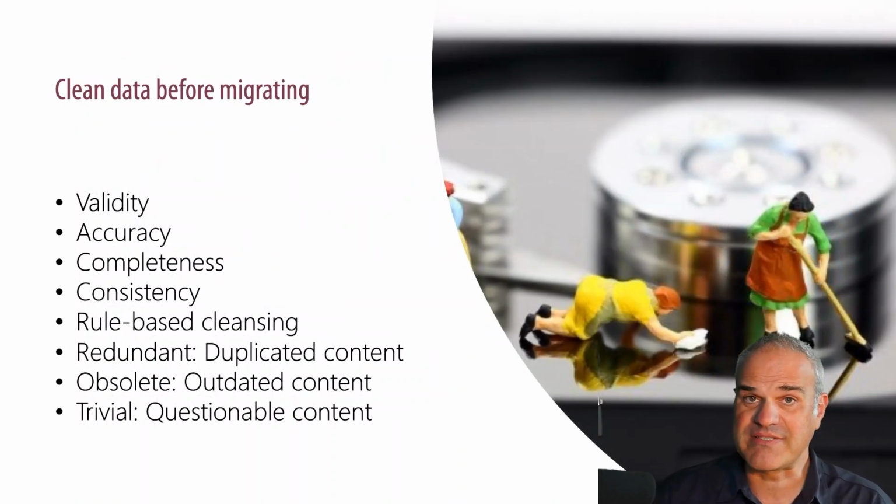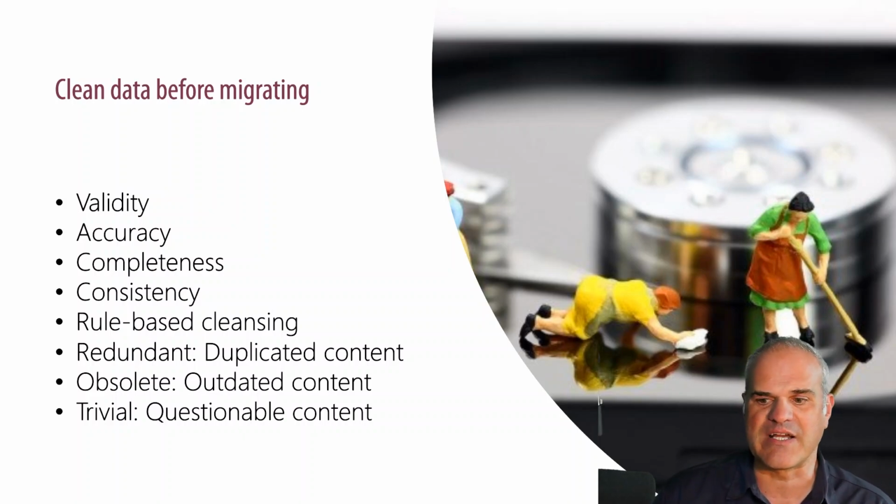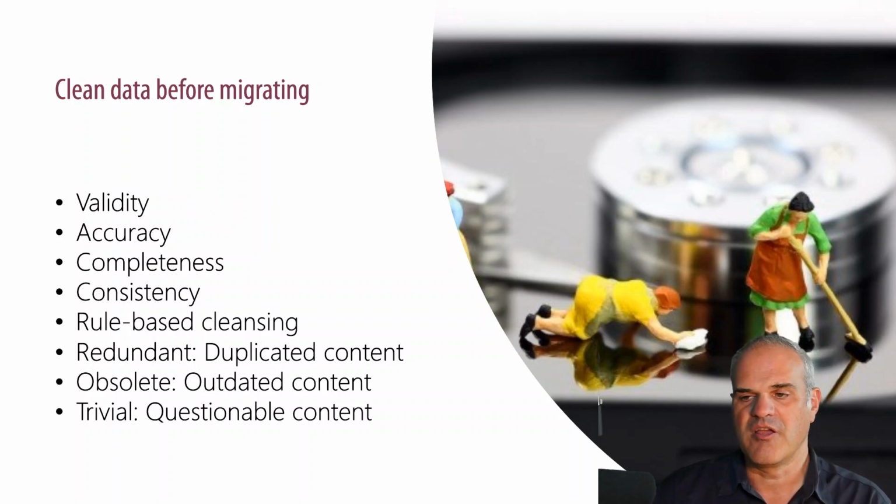The best recommendation I can give you as a vendor is clean data before migrating. Make sure you know about data accuracy, completeness, consistency. Make sure you know more about rule-based cleansing and you have a clear understanding which content is duplicated, redundant, obsolete, outdated, or trivial. Because if you reduce the amount of content, you need to pay the ISV who is selling the tool less money.